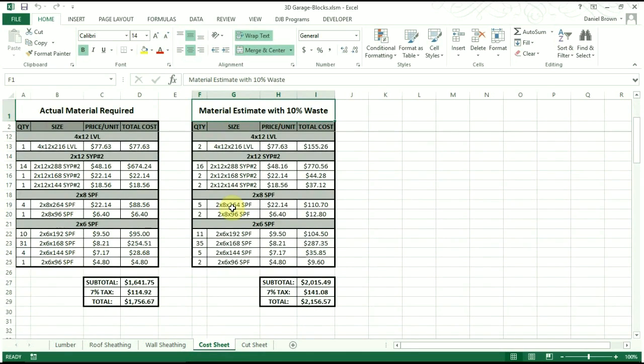And so when I do the bid to the customer, the way I used to do it is I had fixed labor costs and I had material cost as a maximum. I give them a bid and it was not to exceed. So the labor cost will stay fixed, and the not to exceed means that the customer won't pay more than $21.56.57 for the material. I expect to pay $17.56.67. So that's how I would work it.